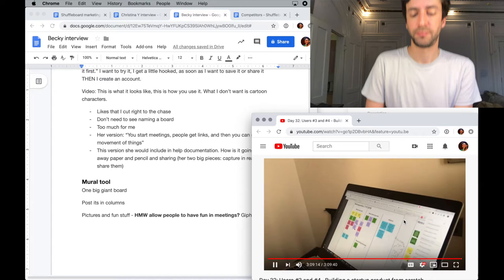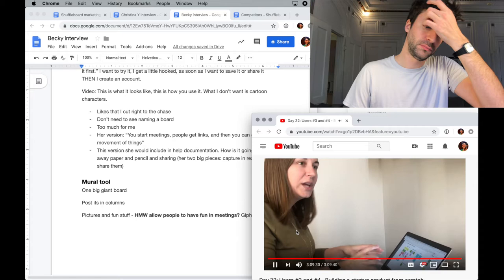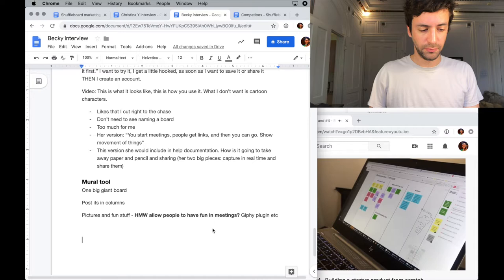Because sometimes when you're doing a retro, what you want to come out of the retro are things that you can actually make some improvement on. And sometimes people just needed to say, that really sucked, that thing I worked on really sucked, but then when we'd say, okay, well, what do you want to do about it, there wasn't anything to be done. So we started adding a kvetching corner section so that we could at least still voice those frustrations, but when it would...